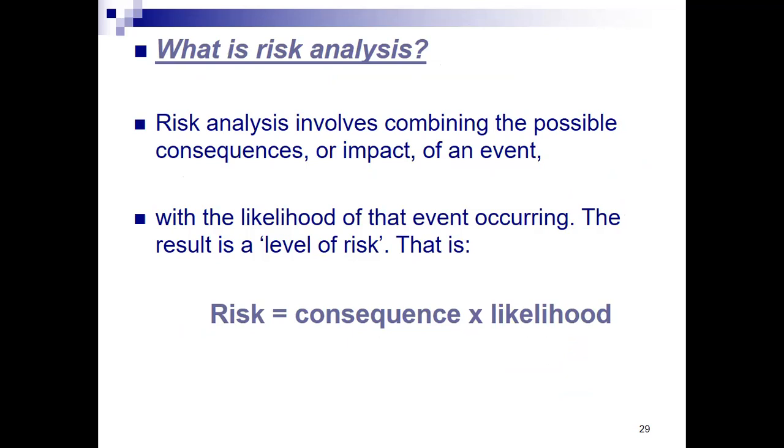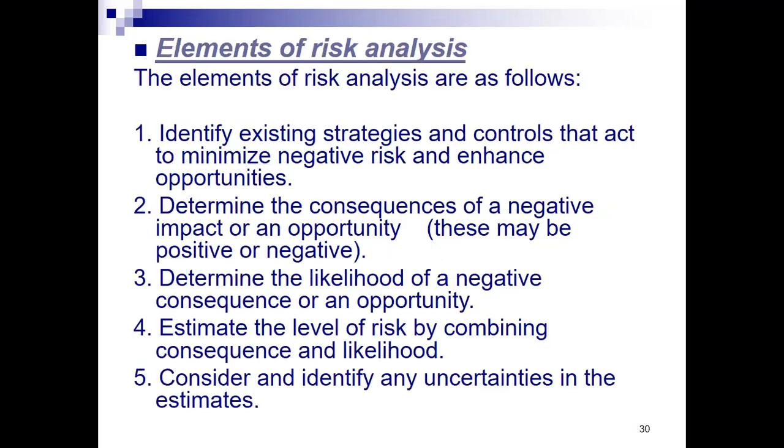So with this formula, risk equals consequence, whatever that be, could be an amount, could be actions, times the likelihood that it can happen. And this formula, it's supposing that it's going to be quantitative or mathematical in nature. However, we can also apply other things like qualitative in nature.